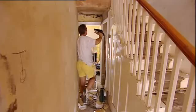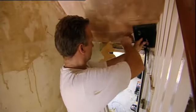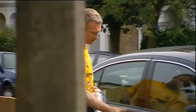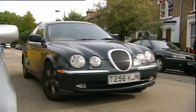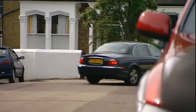Even more dangerous is not to be around whilst work gets underway. If David really wants to make a living at this, he needs to be on site daily. Instead, he's taking 2 whole weeks out of his meagre 8-week schedule to go on holiday, leaving his builder and roofer to start without him.